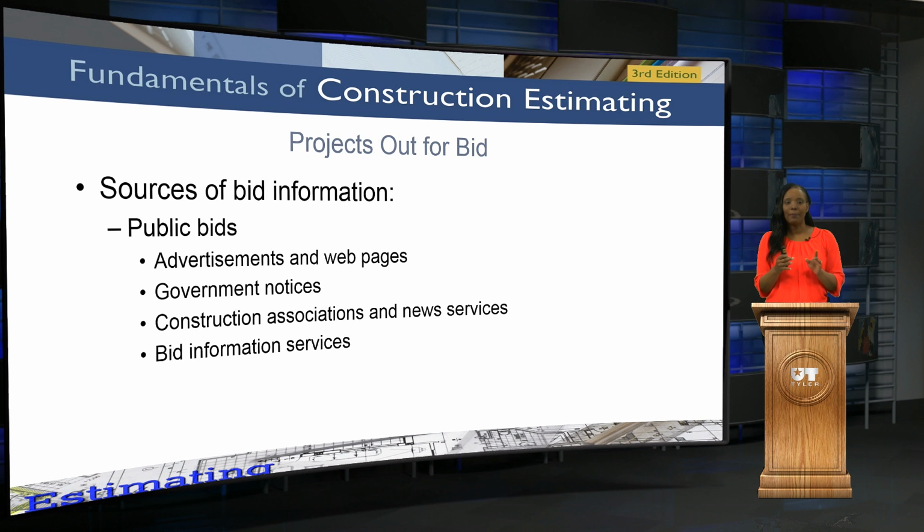Now, let's just talk about public and private bids a little bit. We reviewed this already in Intro to Construction class, so you should have a good understanding about the difference between the two. With our public bids, public authorities are really required to comply with regulations that control the award of construction contracts, okay? The requirement usually means that they have to use an open bid system. And that really is one in which it allows a lot of various contractors to actually bid on that particular job. So it's an open type of system, okay?